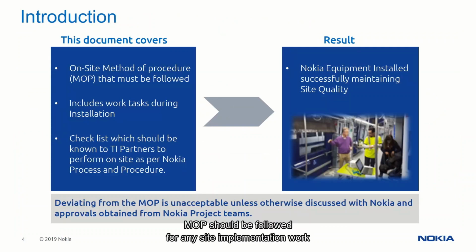MOP should be followed for any site implementation work to meet accurate quality criteria. Generally, deviation from MOP is not allowed, but in exceptional cases, if any deviation is needed, approvals should be requested from the Nokia project team before moving ahead.